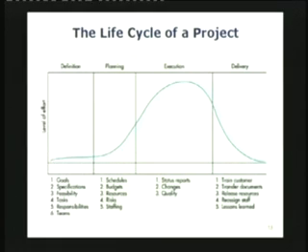And as we discussed, there are steps involved in each of those, and they better be complete right there. Something that is very important for us to realize is before you move on to the next stage, a gate has to be crossed. This gate is basically the quality control gate. For example, as you move from defining to planning, the scope should be very clear. Without that, your planning will be all lopsided. Before you leave planning and go into execution, all the details must be laid out.